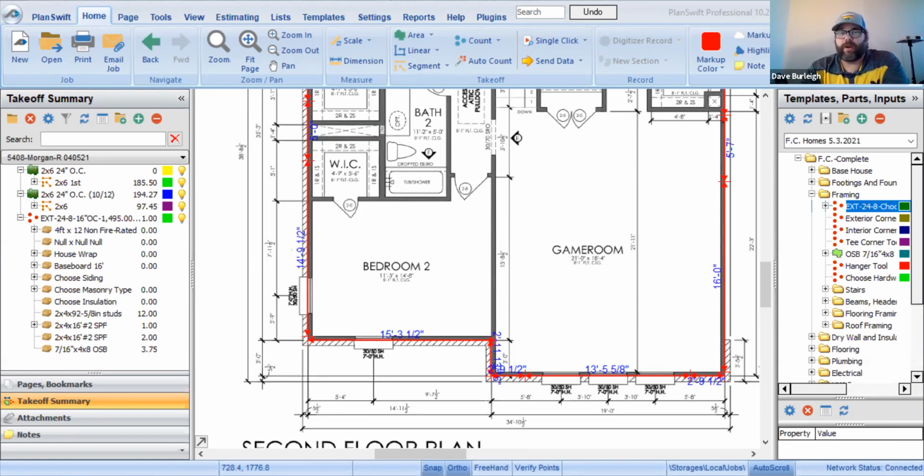If we're framing our first house using this methodology, we need to have a builder on site while the home is being framed. As a purchasing guy or an estimating person, I want to make sure that I'm in tune to what's happening, that I'm making sure the lumber list is adequate, because I'm holding my framer accountable to framing the home the way that I asked them to frame it.